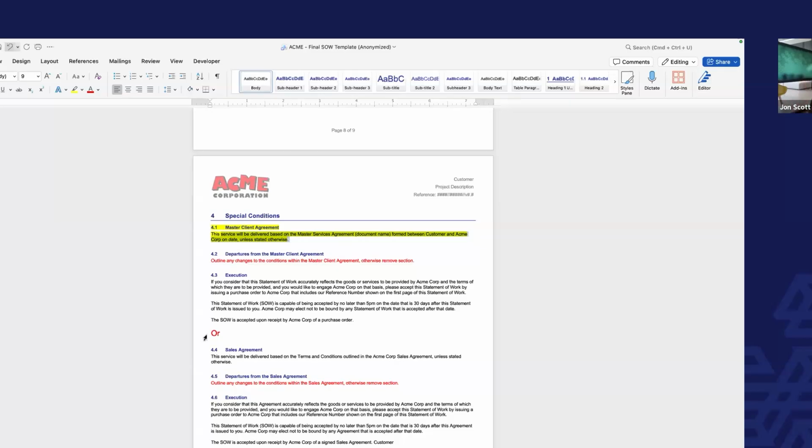Why that is helpful is most redlining is done around the legal language around billing and invoicing and all that fun stuff. So if you can remove that and pre-agree upon all that, your statement of work becomes shorter, and it becomes pre-agreed upon, right? And then the technical accuracy is what you're focused on, not the legal terms and conditions. So I would say have a master services agreement, and make sure that's in place before you scope a project, or again, in parallel.